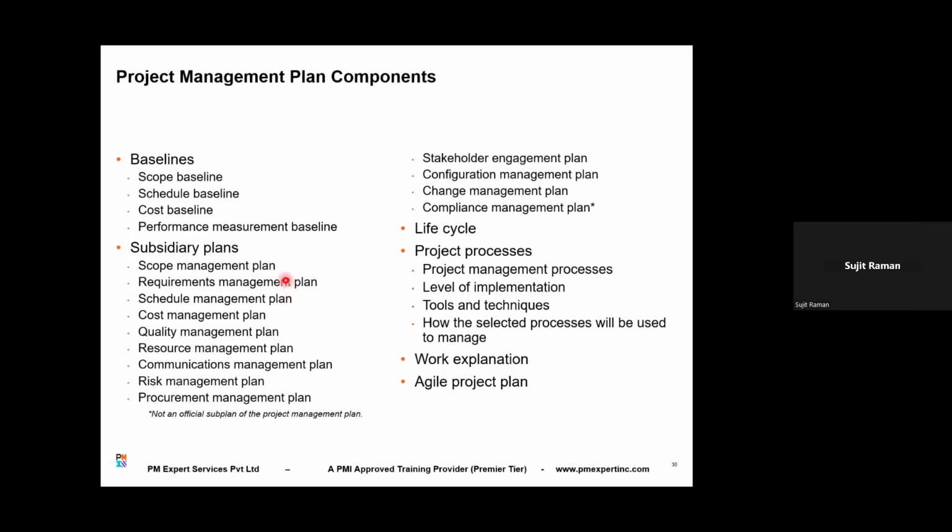Now, can you see the scope management plan? The scope management plan tells you how scope will be managed and controlled. In fact, how scope will be defined, decomposed, managed, and controlled. The rules of the game for scope, how changes to the scope will be performed, right? That is the scope management plan. Now, just a question to you. I have defined the scope management plan. Will the scope management plan contain scope?